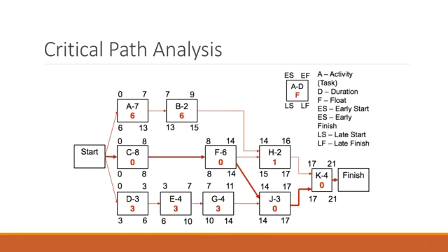The fastest you can complete a project is determined by how long your longest sequence is going to take. That's how we identify the critical path. By identifying that critical path, we know the fastest that we can complete this particular project. I want to clarify this because it's really important, and I've seen many students have issues identifying it incorrectly on the exam.